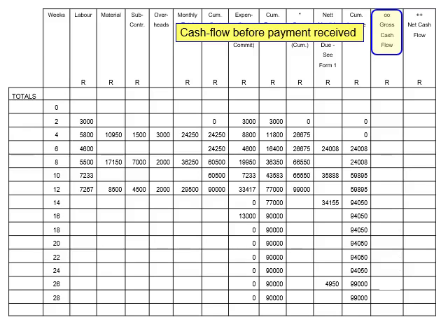To perform this calculation for a specific period, we shall use the amount in the previous period, under the cumulative income due column, and deduct the amount in the current period, under the cumulative expenditure column. This is a dogleg calculation. Let us perform the calculation, and it will explain itself. Let us start with week 2.